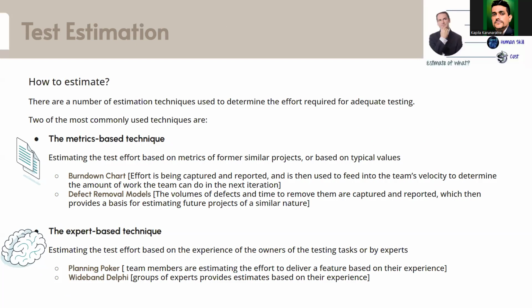Even if you derive the estimation, that estimation will change based on the materials you are going to use. You plan to use a certain cement, but you couldn't find it, so you use some low level cement, and that impacts your construction.